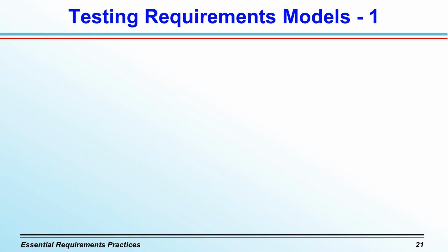If there's a path in the model that isn't highlighted, that could indicate either that you're missing a test to force that path, or that that path does not reflect a legitimate requirement or legitimate system behavior. Conversely, if a test has no corresponding path to trace in the model, either the test is invalid or the model's incomplete. Either way, that disconnect tells you there's a problem.